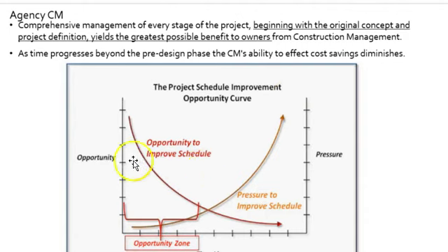But the moral of the story, the real important part here, is the people who could help you the most, if they're on board at the very beginning. As the project moves on and actual construction begins, everybody's ability to influence the project in a positive way diminishes. So big decisions up front are super important, and getting your team, whomever you need, on board early on is critical.